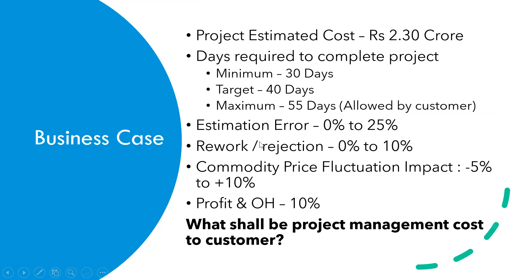Here there is one project — the estimated cost is around 2.3 crore. As per the project management team, they would require around 30 days minimum to complete the project, but targeting with a buffer of 10 days, up to 40 days, they think they can complete the project. The customer in the tender has allowed up to 55 days, so even if they can't complete it within 40 days, they have the threshold of up to 55 days.